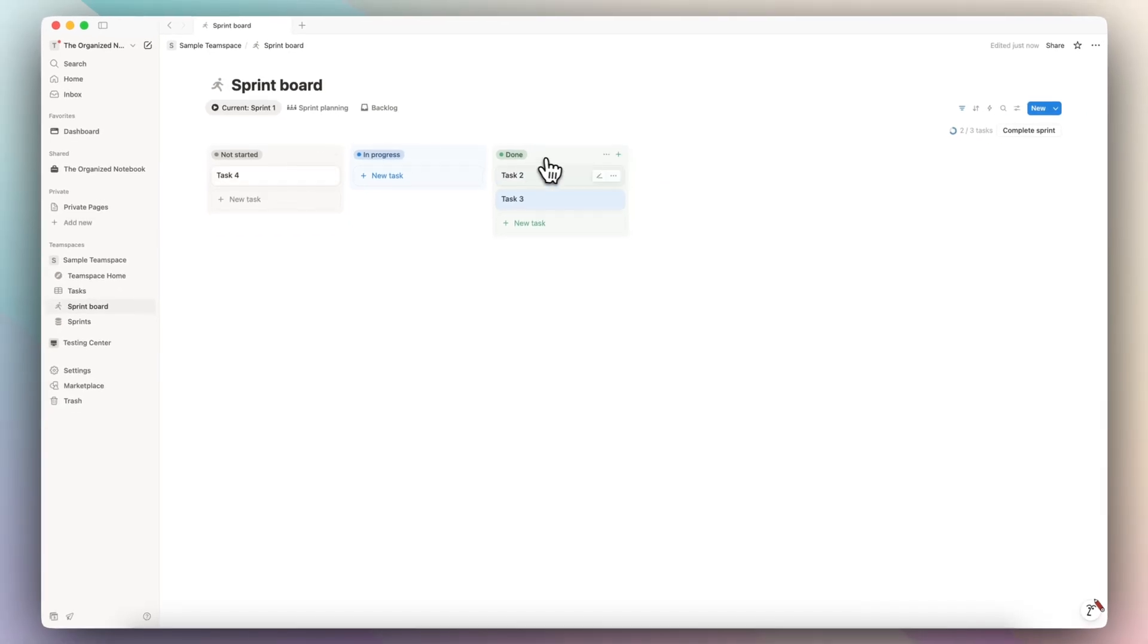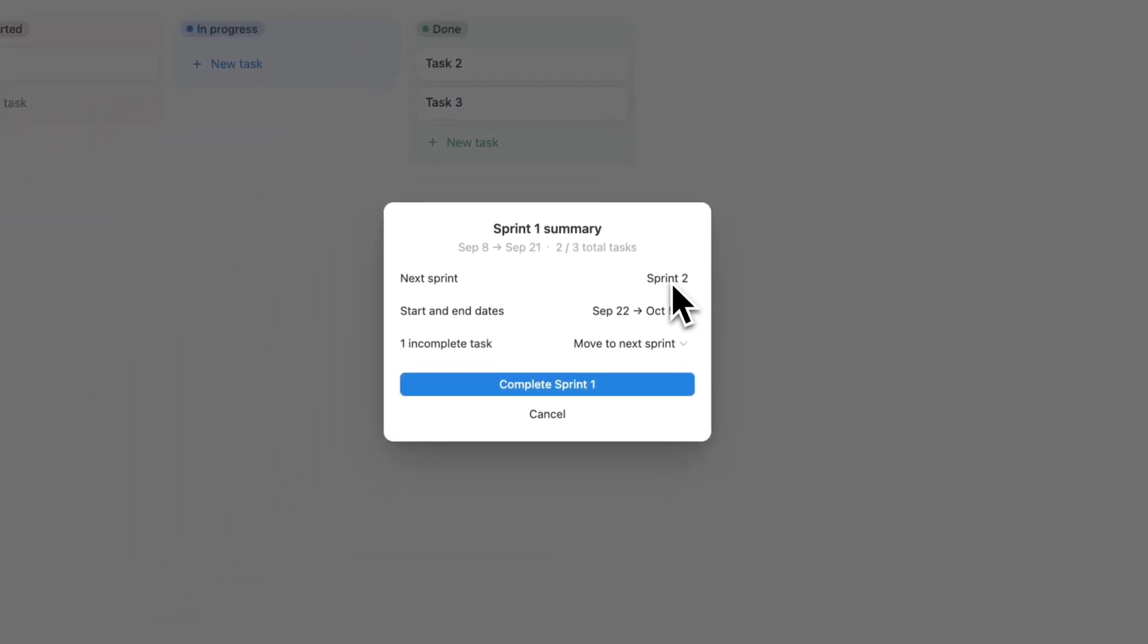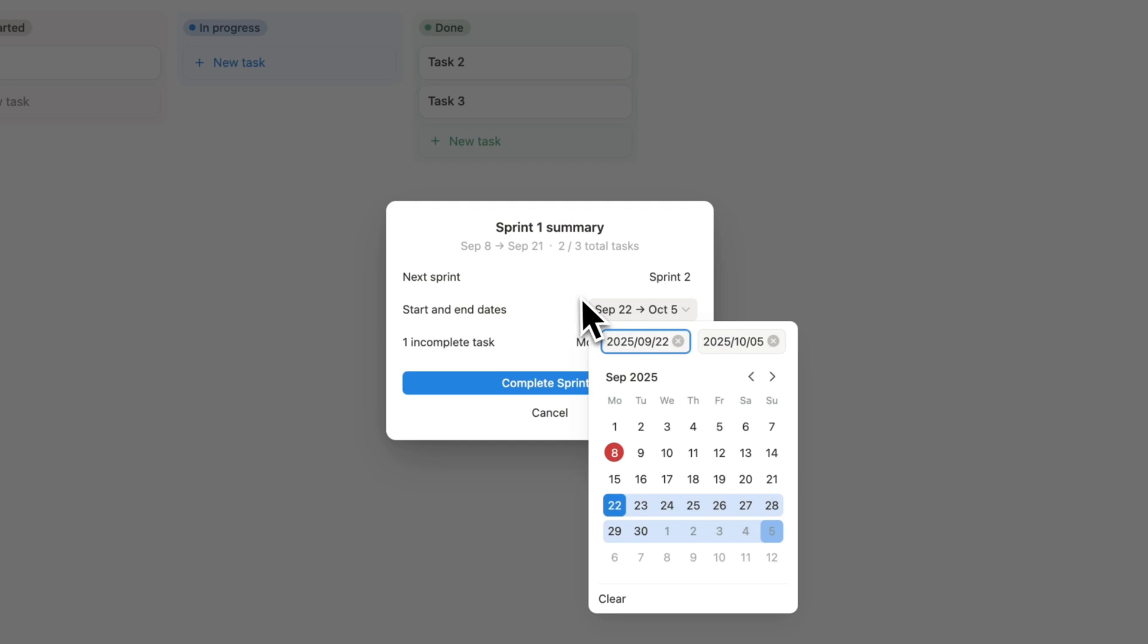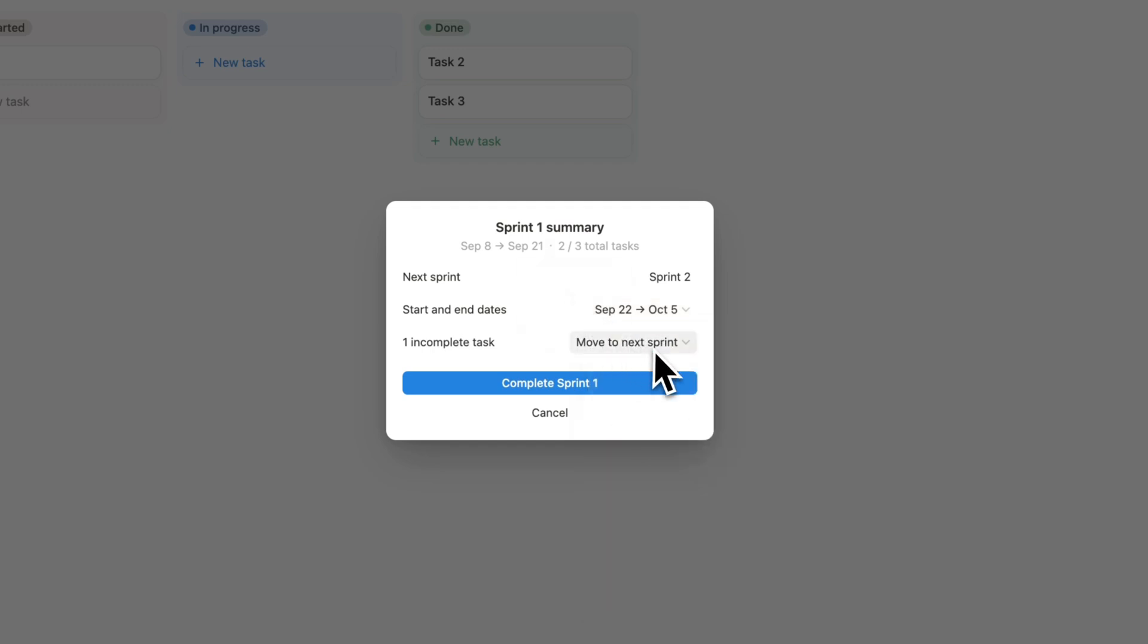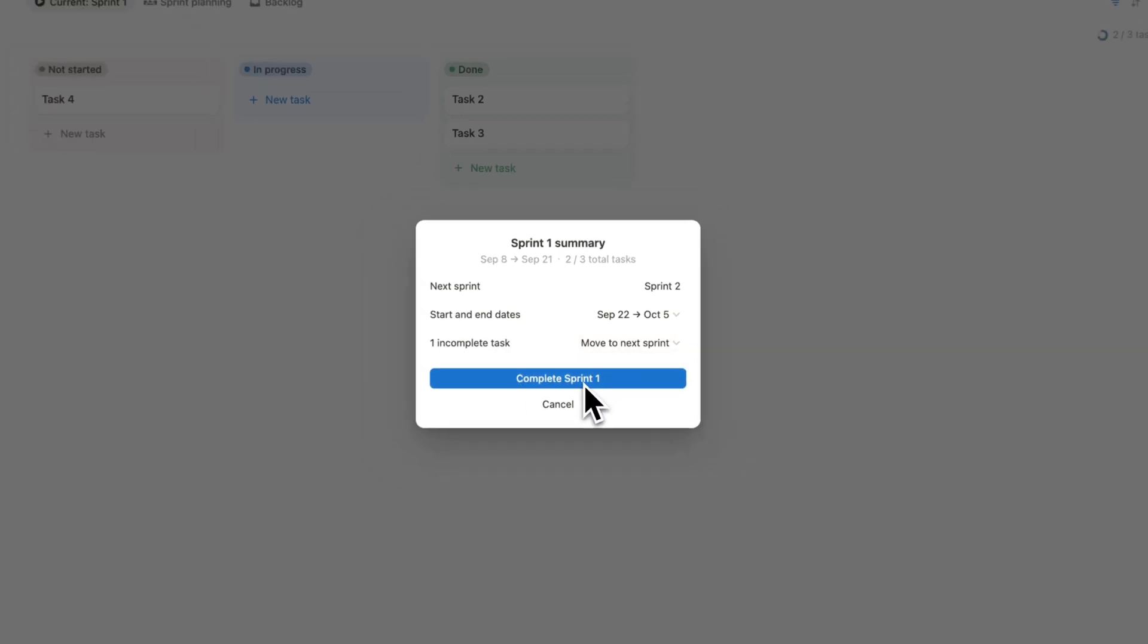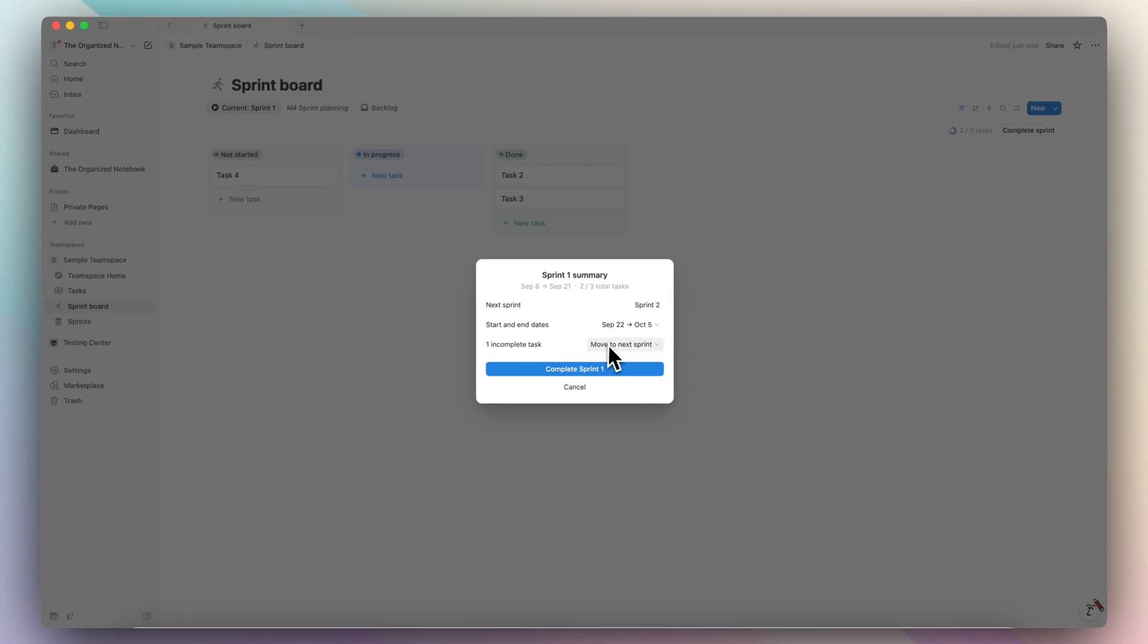So when you're at the end of the cycle, you're going to click complete sprint, and it's going to show you what the next sprint is going to be based on what you've assigned it. Then you can check the start and end dates for that. And then you can choose what to do with the one incomplete task, which is to move it to next sprint, move to backlog, or keep it in the current sprint. So I'm going to go ahead and complete sprint one by moving the one incomplete task into the next sprint.